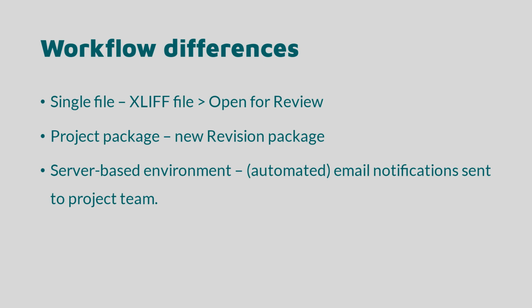In the project packages approach, the project manager must receive the packages and unpack their contents to verify the completed translations have all been processed and returned. The project manager must then create new package files to send to the revisers, containing the translated materials, the client-specific terminology database used, and any other relevant files. A new translation memory may be created in order to capture any amendments made by the reviser.